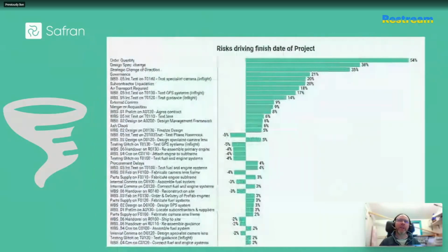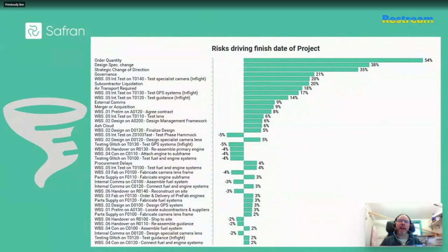So with respect to projects quantitative risk analysis, or QRA, typically you'll have seen what's called a tornado chart. They're used to visually rank those uncertain variables that influence the selected outcome the most. And it gets its name from visually resembling a cone shape, so wider at the top, narrower at the bottom, just like the extreme weather phenomenon.